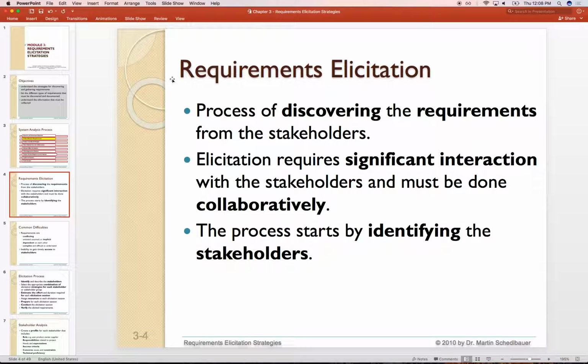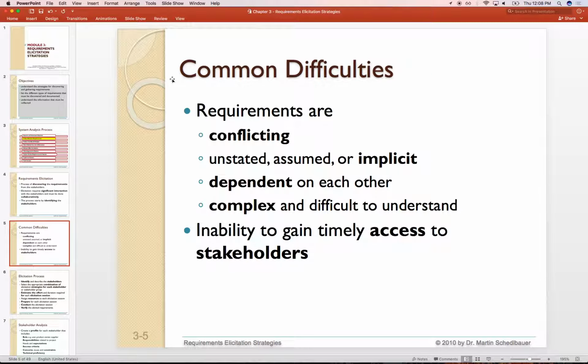One of the hardest things is first to identify who the stakeholders are. Should I be talking to this person? Does this person actually have any say on how we should do it? A lot of the interviews will end with, who else do you think I should be talking to? Because they might ask, why is this person talking to me? They should be talking to X. Coming from the outside, not knowing the structure of an organization, it would be very hard for you to identify if the person you're talking to is relevant. So identifying the stakeholders is certainly one of the challenges here.